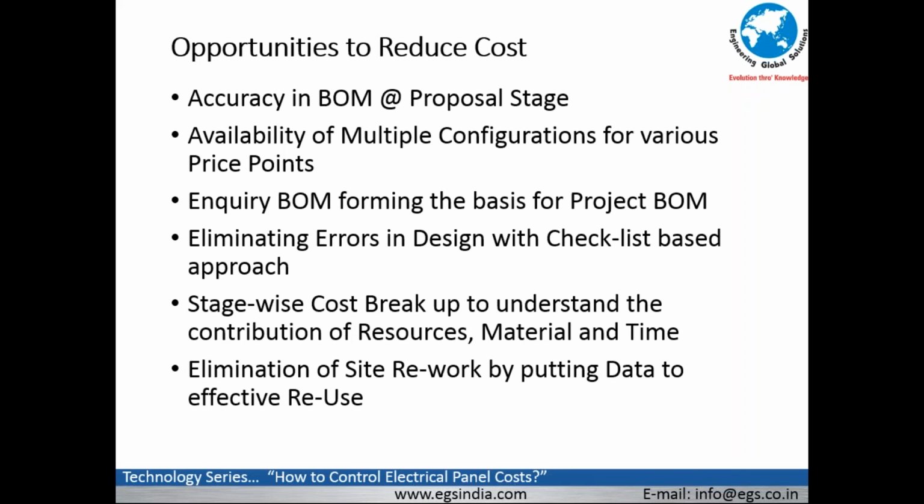In other words, the budget bill of material for the project, once the order is signed off, is inherited directly from the inquiry bill of materials. Now, looking at the inquiry bill of materials going to the project bill of materials, and at what other things got added which never got factored into the costing calculations at the inquiry stage, would throw a lot of light in the organization as to where the money is going.